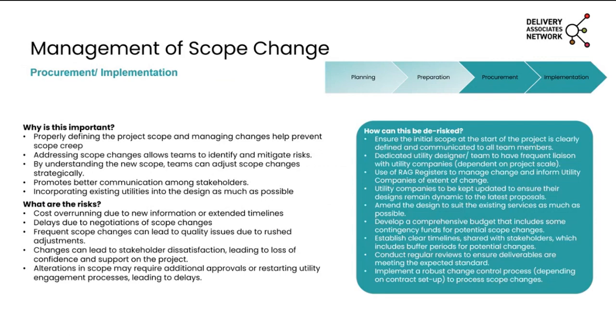Next part is how we go about managing scope change. It's likely on a large infrastructure project that the design of the project itself will change during the lifespan of the project. So the first thing is to establish a baseline at the start of the project, so you have a baseline that everybody's working on and knows where that stands, so that any change can be